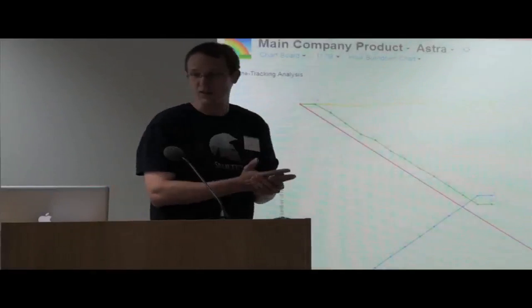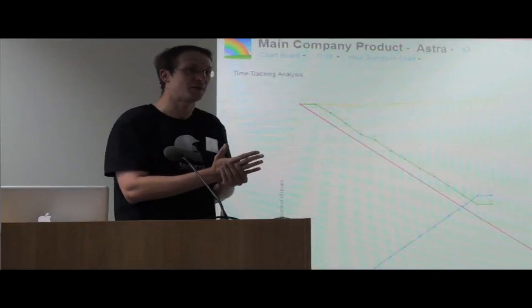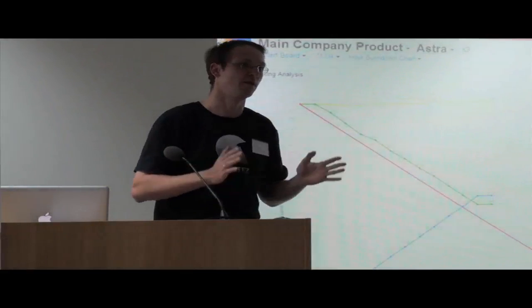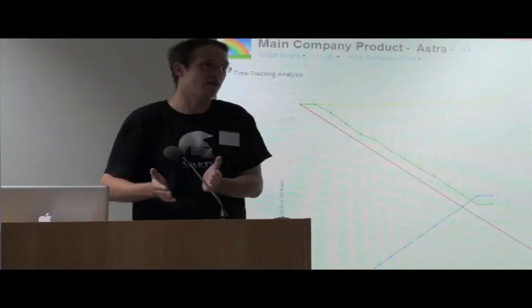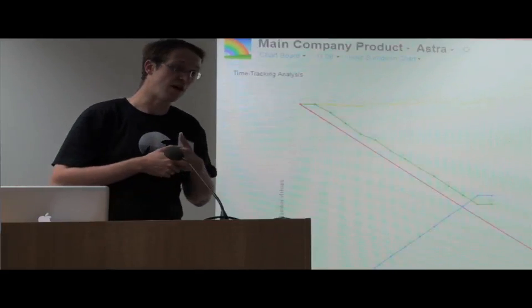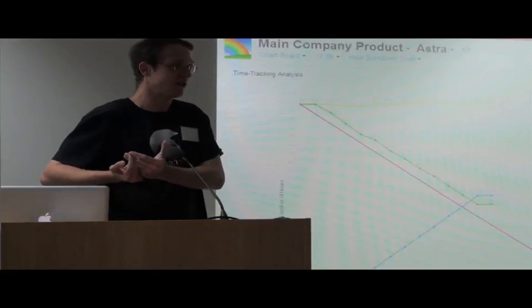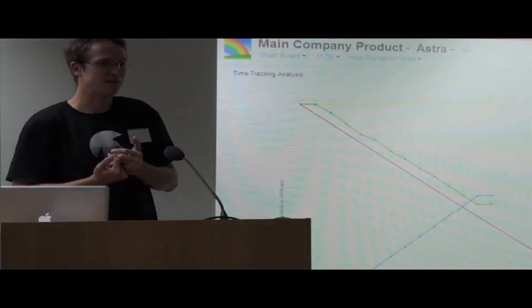If you have just a single version, say 11.2, you can specify it once. You cannot specify a different end date for each team. And the problem with these few days was that burn-down charts generated by GreenHopper were completely screwed, because either the first 5 days were cut or the last 5 days, for example, in the worst scenario. So at this time we did something which we normally don't ever do: we modified 4 or 5 classes of GreenHopper, and added a concept of injectable strategies to GreenHopper itself for how to treat end and start dates of iterations.